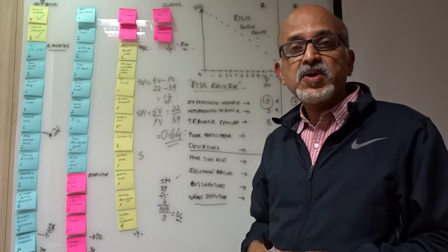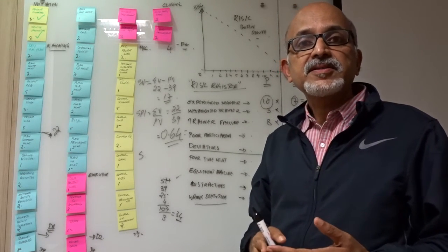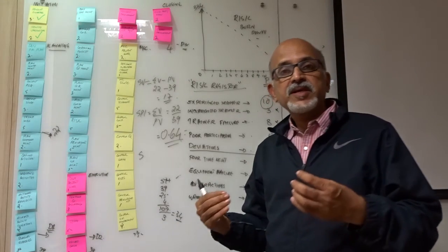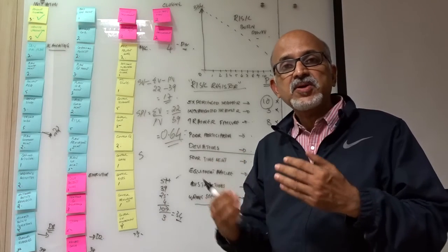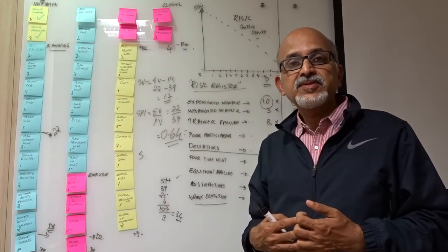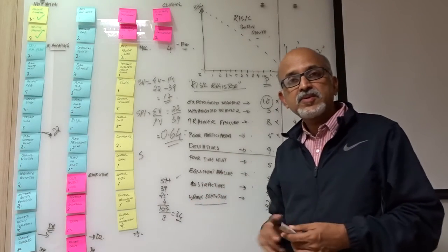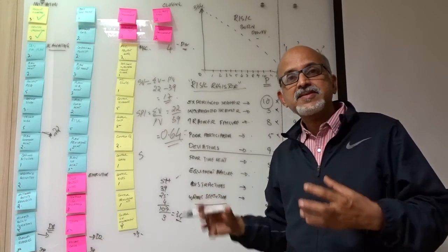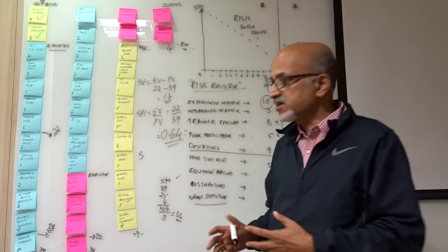So we spoke about two things. One is the risk register: identify all the risks, then rank those risks based on probability and impact. That is P into I. This process we call qualitative risk analysis. I thought no point in talking about these things separately. I wanted to demonstrate the power of this as part of the training.